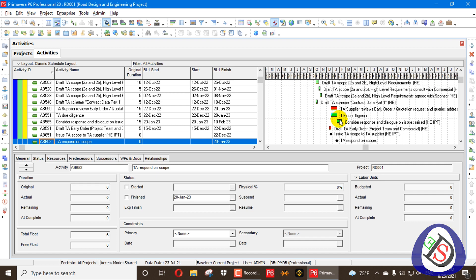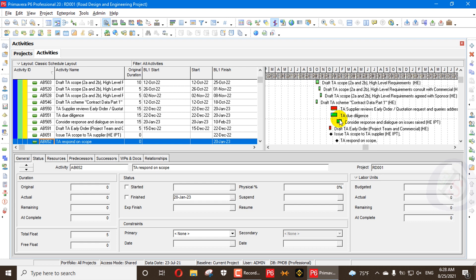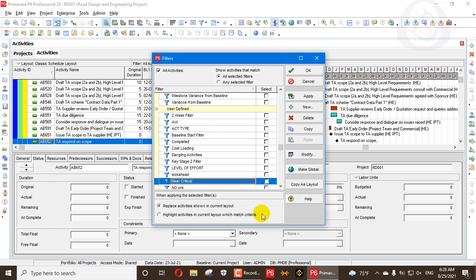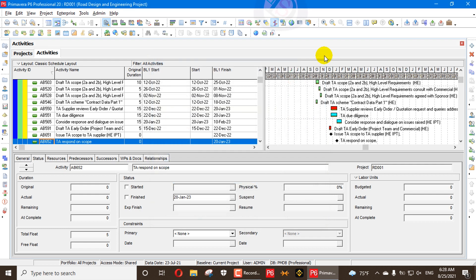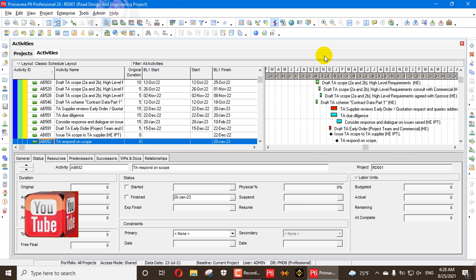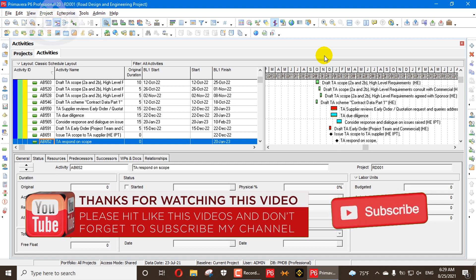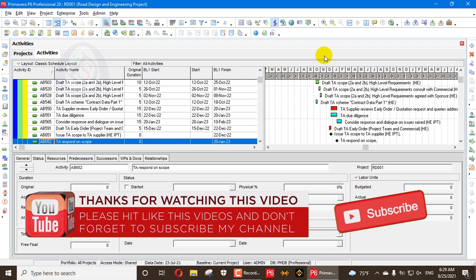Here I have decided that if my float is up to 10 days then my activities are near critical. If you change the schedule's critical value from 0 to 10 days, this filter will remain the same until you go to right-click, filters, and manually change it. Please remember that the near critical threshold is decided during scheduling and is decided by your client or consultant — it can be 7 days, 10 days, or 14 days.